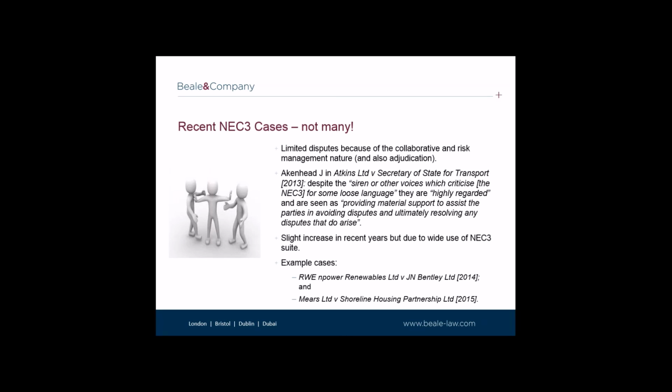During that period, the parties departed from the price list and agreed that Mears could submit invoices based on some composite codes which were proposed by Mears. It was agreed that the contract did not need to be amended to reflect this. The contract was then signed and stated that it applied retrospectively.